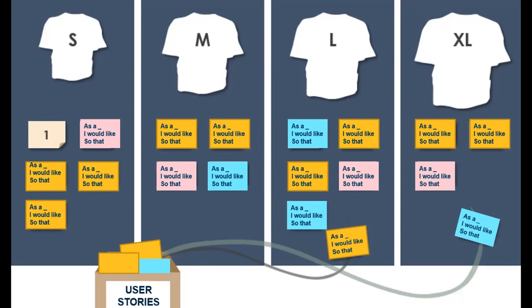Now, as you can see, we could also go a step further when we've sorted all of the stories into these categories. And I mean, it's very quick and dirty. It's very fast. And team members simply group items together that are like-sized, and it results in this configuration. Now, when all is said and done, we stand back and then we ask the question, okay, what is blatantly wrong? What don't we agree with? But we're not getting into so much minutia. Close enough is good enough. And this is extremely speedy.